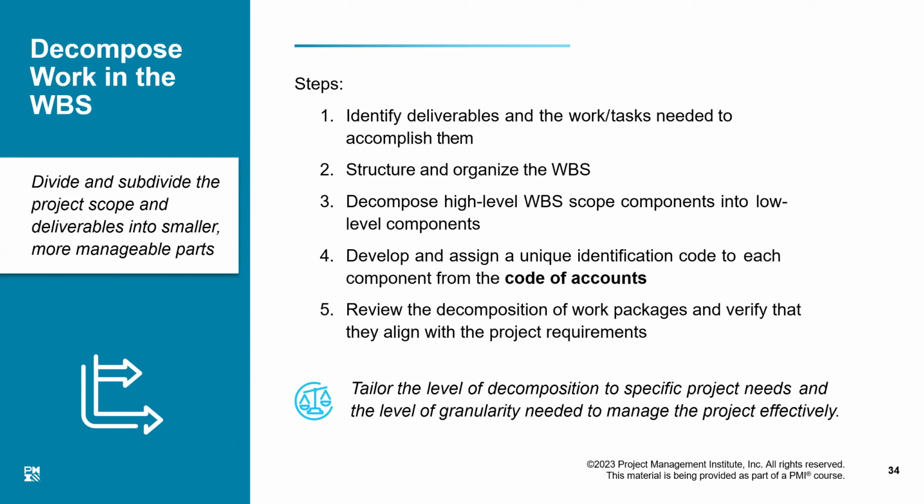Next is to structure and organize the WBS, decomposing high-level scope components into low-level components, like the project broken down into phases, broken down in some other way. Ultimately, the lowest level of a WBS is generally considered to be the work package, and it is the level at which the project manager will measure progress.